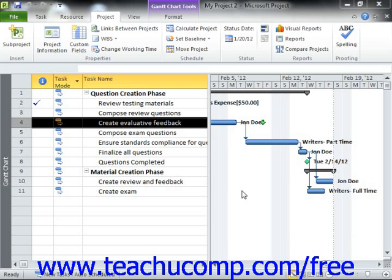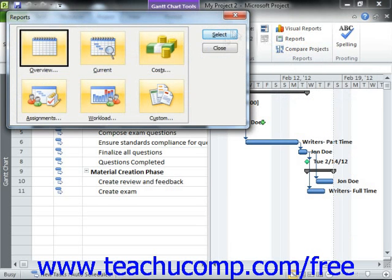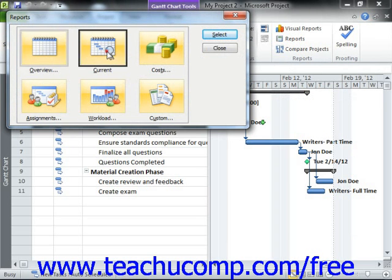To open a report, click the Project tab that appears within the ribbon, and then click the Reports button that appears within the Reports button group. In the Reports dialog box that appears, you'll see the report categories that are available: Overview, Current, Costs, Assignments, Workload, and Custom. To view the reports available within any category, click on the icon for that report category, and then click the Select button.